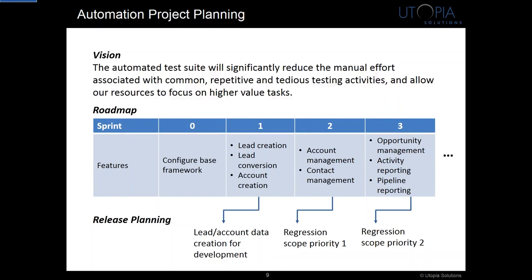And if I ask what they hope to achieve with automation, the most common answer is, well, to automatically execute test cases or reduce my test cycle time. Nothing specific about what that means or what the specific benefits might be. And what this leads to is jumping right to release planning with no overarching objective to guide the development of the roadmap and eventually the release and sprint planning. So take the time to think about what you can achieve with automation. It'll make the backlog development, release planning, and sprint planning much more effective and help you come out with a much better implementation in the end.